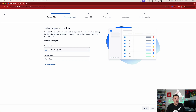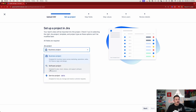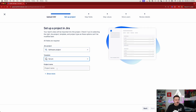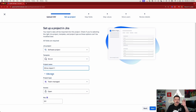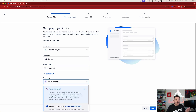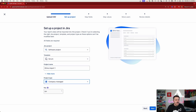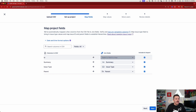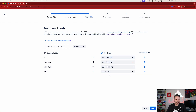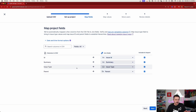This new import experience forces you to create a project, so I'm going to create a software Scrum project. I'll give it the name 'Demo Import One', then click Show More and switch it from Team to Company-managed — we never make team-managed projects here. Leave the key as is, click Next, and now you do some field mapping. I like this part of the UI — issue ID maps to issue ID, summary to summary, issue type to issue type, parent to parent.